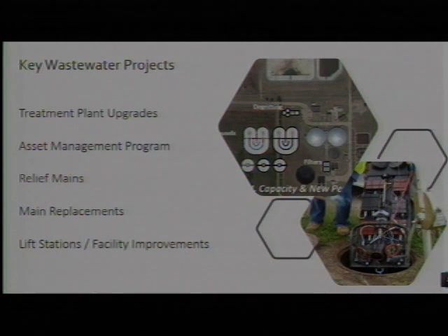We're also going out for engineering right now, which we plan on awarding in the next quarter for the odor control and biosolids for our treatment plants and for our Witcher lift station. The asset management program, that one we are about halfway through. We're moving along with the triage approach. We have completed half of the acoustic inspections, which is approximately 126 miles, and we've inspected over 3,000 manholes. We've also had over 30 miles of CCTV done so far, and we are on track to finish up that first area in January, and then we'll be awarding the second area.